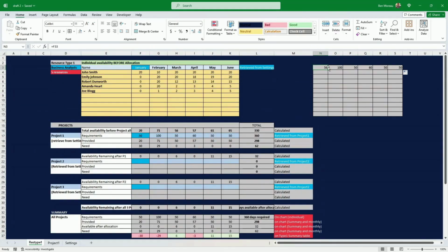So here we had an overall requirement of 50. First of all, we check how many of those days have been used. If the requirement is greater or equal to the resource available for that resource, then we give it all. Otherwise, we need 0.